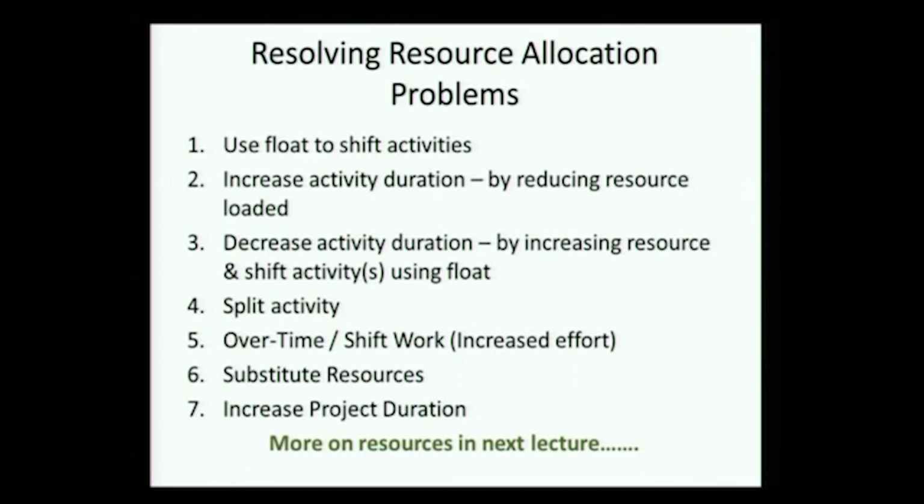Then another way is to substitute resources. You say, okay, I am not going to use a truck, I am going to use people to shift what I am going to do. I have workers, I do not have trucks, it is going to be slower, but it is going to work for me. Kind of a real thing. And finally, if you have no option, you increase project duration and justify why the project duration is increased in this context.